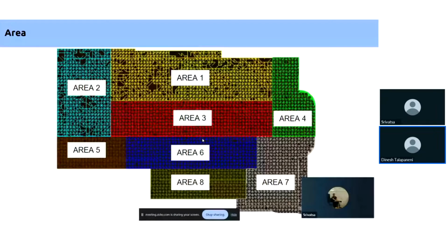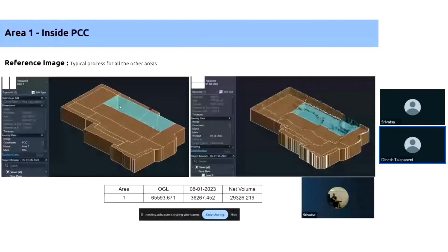I mean, for the contractor. You would have already issued an order; if not, this process will give an accurate quantity to place an accurate order. Then every 15 days, or based on your billing cycle, we do the scanning and get the present profile.